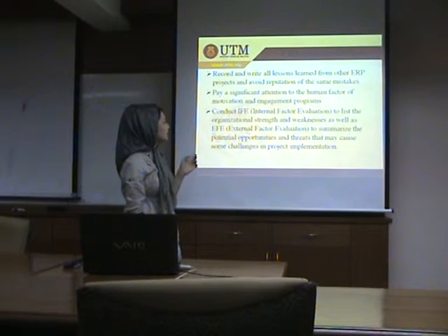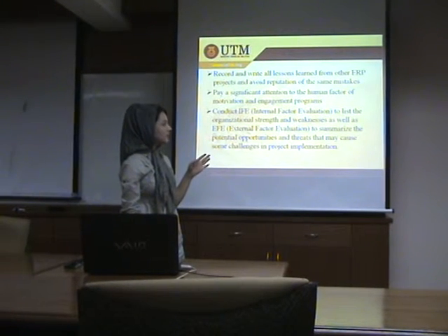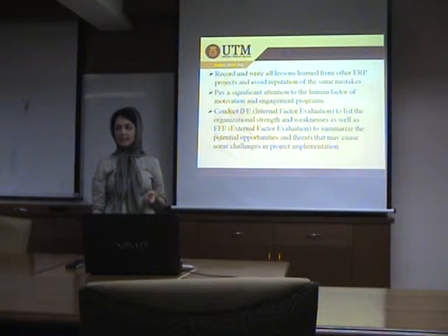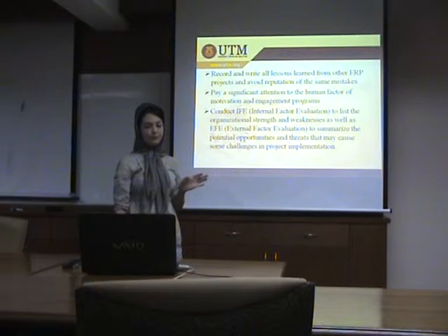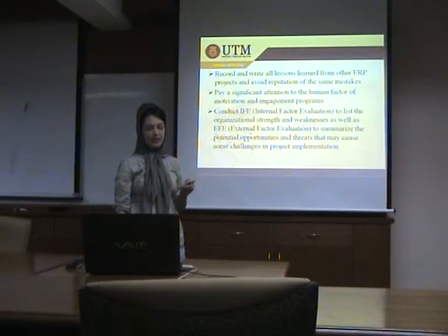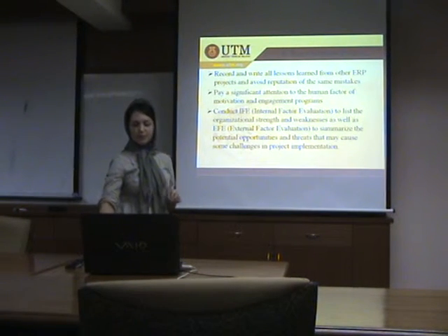The organization has to conduct IFE. IFE stands for Internal Factor Evaluation, to list the organizational strengths and weaknesses, as well as EFE, External Factor Evaluation, to summarize the potential opportunities and threats that may cause some challenges in project implementation.